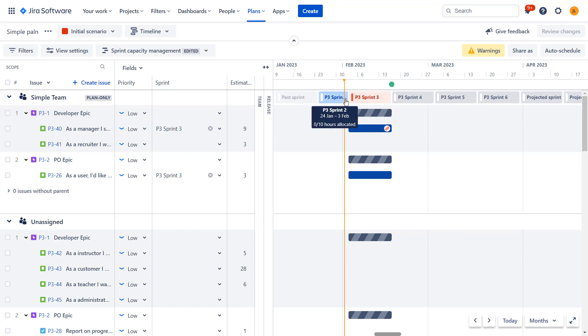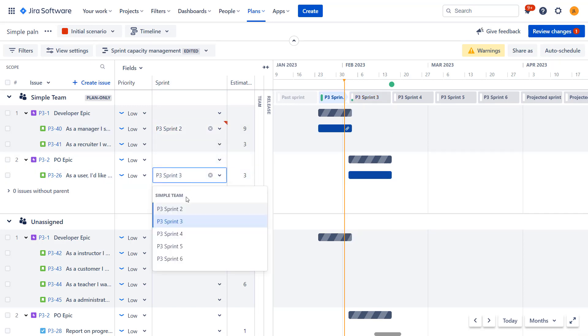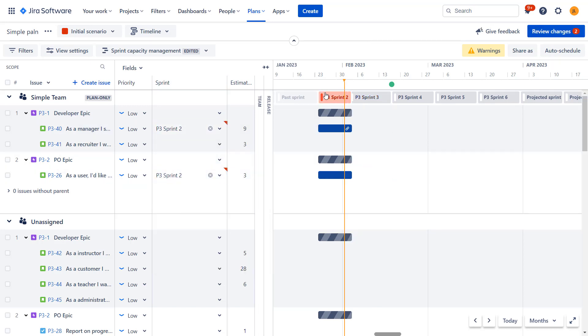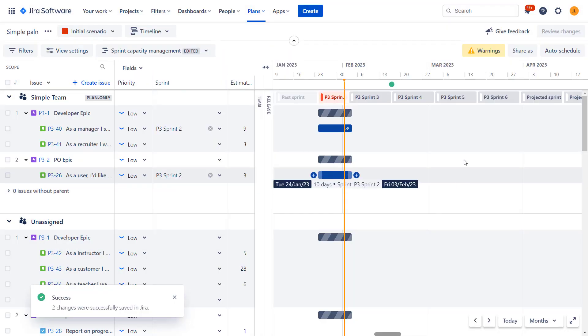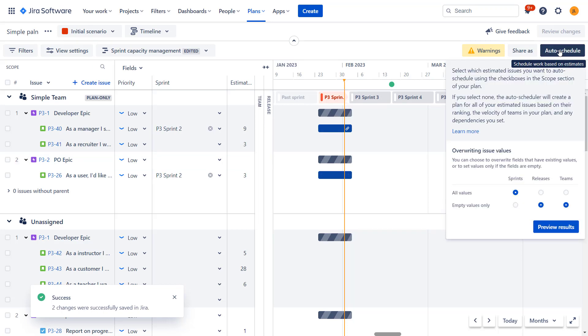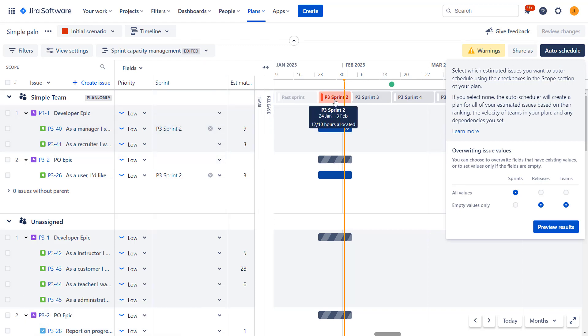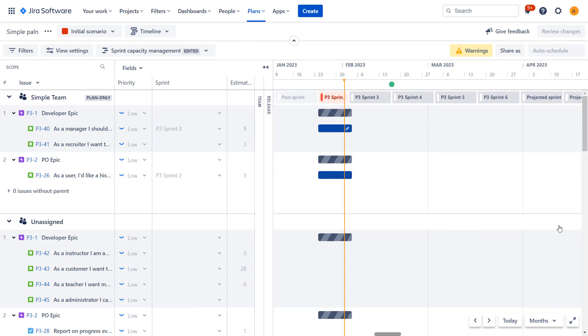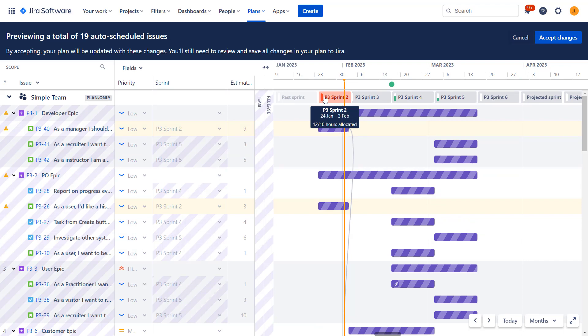You can see that the active sprint is this sprint second. So let's actually change these tasks to be planned for second sprint. And you can see that now this sprint is over allocated. Let's click auto schedule all values. So auto schedule at least last time, distributed work from this sprint to other sprints so that it wouldn't be over allocated. Let's see here how it works now. It did not at this time. So this sprint is still over allocated. Why? This is because auto schedule does not update current active sprint.